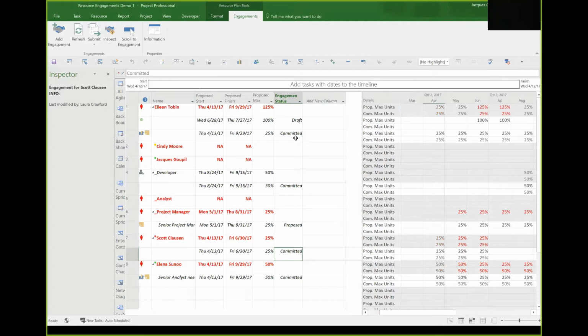And now when we start decomposing and making these assignments, I know that I have X amount of resource for this time period. As I go ahead and submit this, Microsoft Project is smart enough to say, hey, project manager, you have more resources allocated to this project than your resource manager has committed to you. That's pretty cool. You'll see that up here with a little indicator that says this resource is over allocated. You're using more than what you were committed to, and it's a little flag.